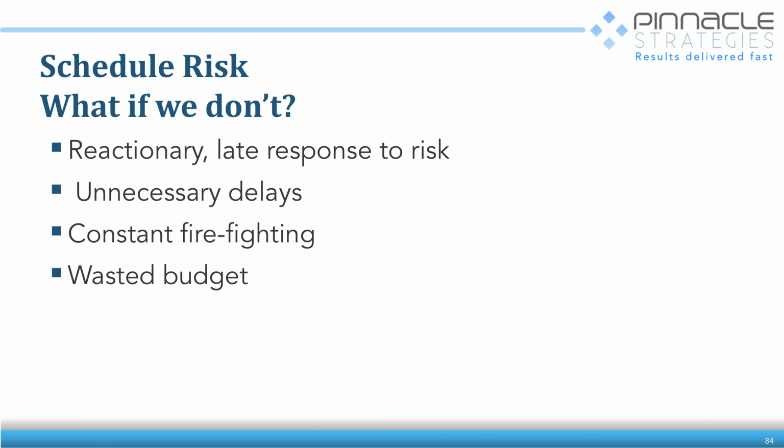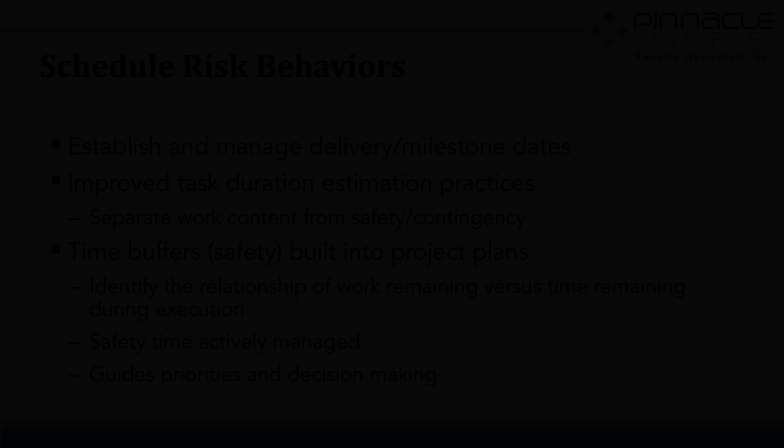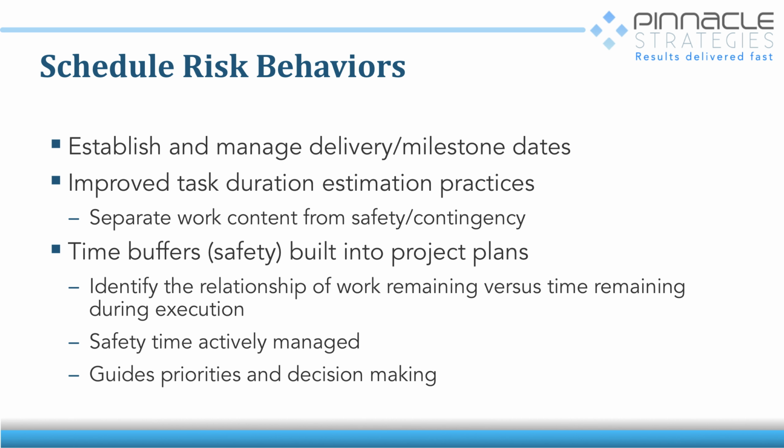If we don't do it, then what happens is we get a reactionary process, right? We get delay, firefighting, and wasted money because we're overspending. So our objective is to have this situational awareness relative to the overall project schedule performance, and consistently identifying how much work is left versus the time remaining, and taking action before time runs out. So we're always looking at this ratio of work remaining versus time remaining and getting a sense of how much project risk is in our schedule.